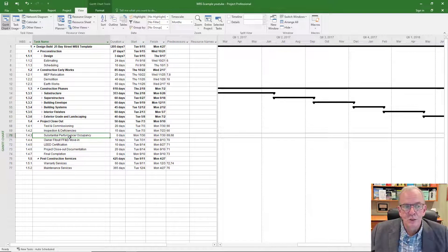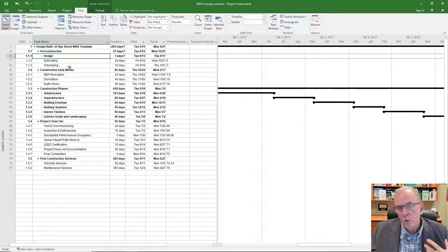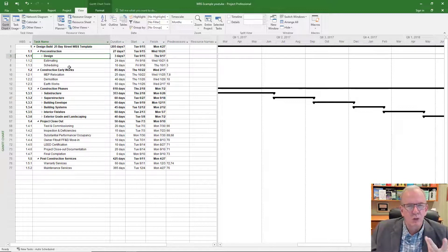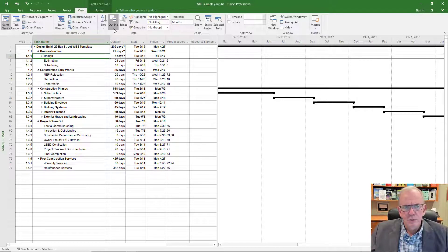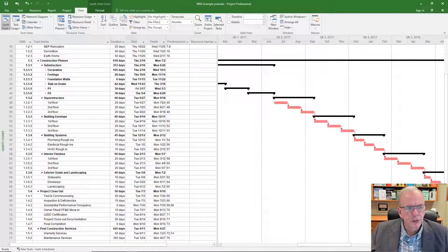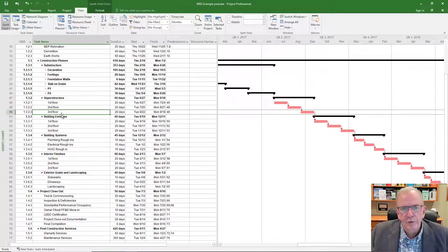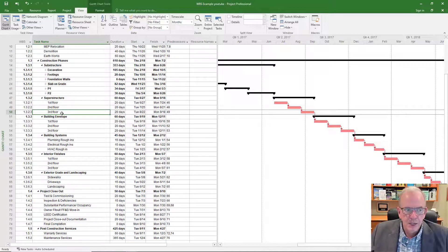The work breakdown structure helps us track costs, break things into categories, and ensure we're not missing a particular area of work. It gives flexibility to create what you need for your specific project. Going to level four, those categories open up — under construction phases I've got substructure, superstructure, building envelope, and building systems. I haven't filled all of it in yet, but for superstructure you could list forming, rebar, and all those aspects for each floor. If the building is 20 floors, you could list all 20 floors.